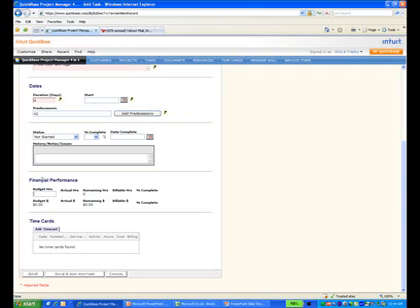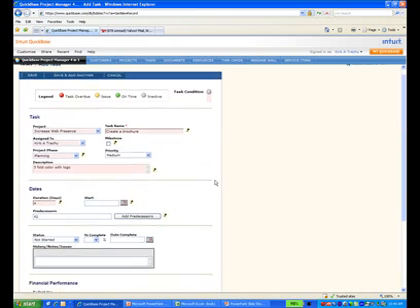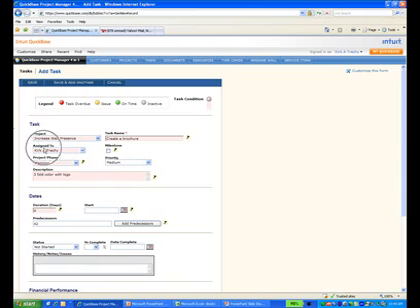Let's say this in total is going to be 4 hours. Notice 4 hours came up with $480. That's a placeholder based upon what cost the company to be working on this project.